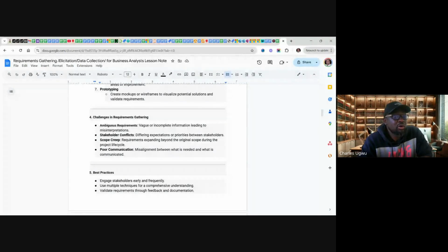Every group will be talking with one voice, because if you are working with the sales department, you have what we call the head of the unit. So whatever requirement any other person gives within that unit must concur with what the head of the unit wants. This will help you reduce the level of conflict of interest.